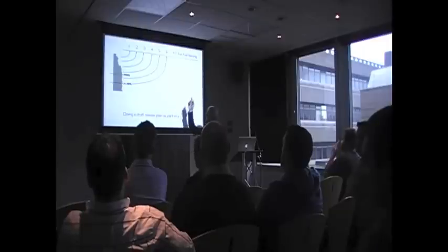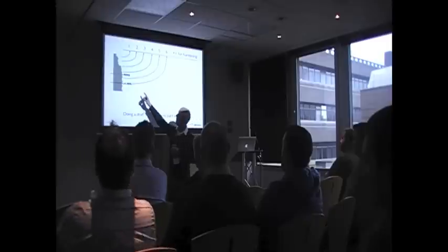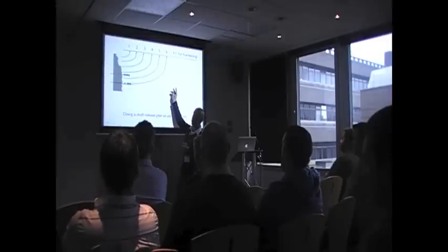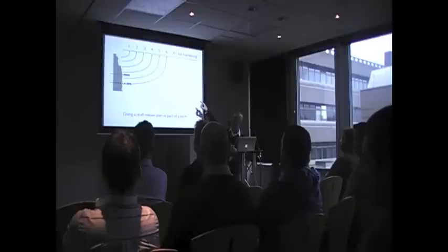And then we add another one just for hardening, for deployment and things like that. So basically to do that MMS level, we set it to be 7 weeks, because that gives us an extra 40%. So we know that we 100% categorically can get everything that we've said above the first red line in that timescale.